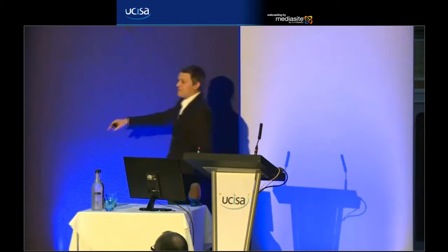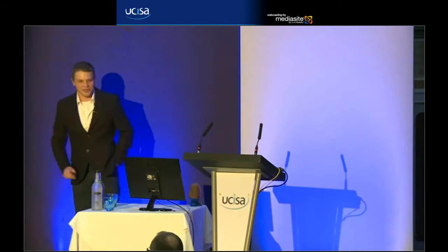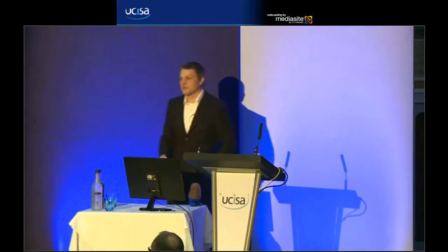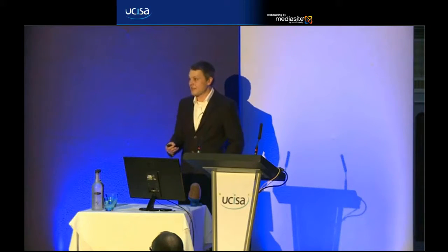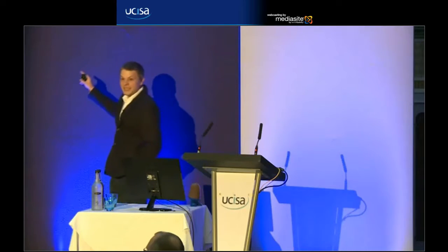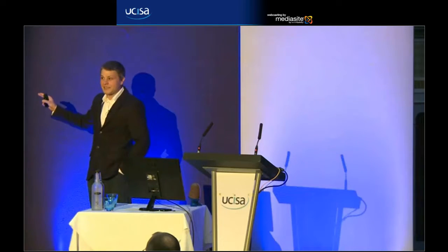And there's no particular reason why we're using these in Agile. It just so happens that the numbers get bigger as they go along. And so it's a useful set of numbers to say, when we're going to estimate the size of our stories, the bigger something is, the less accurate the estimate is likely to be. So we're not going to start to argue about whether it's 56 or 57. If it's in that type of range, we're going to give it one of those numbers.